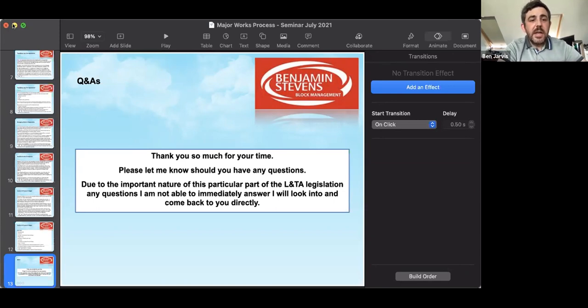So as you can see on here, points 5 and 6 are for the consultation itself and any returned observations. So in here we can note anything that's come back. So the block manager and the admin team can make sure we go back to anyone that has had any queries. So at this point, then number 7 is that sealed tender request that we ask the contractors to send to a specific email inbox. Otherwise, their tender won't be considered.